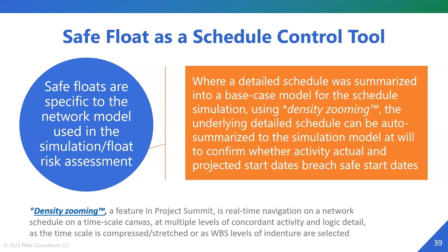So if you want to take advantage of safe float nowadays, and you are strictly on CPM software, then six months down the road, if your detailed schedule has changed as to logic, you're going to have to summarize it again and run a risk assessment. Well, that is DOA. There is no way that you're going to be doing that every few months manually.